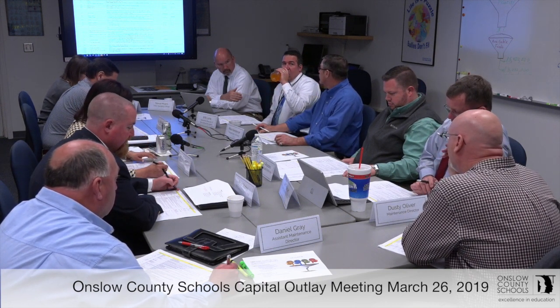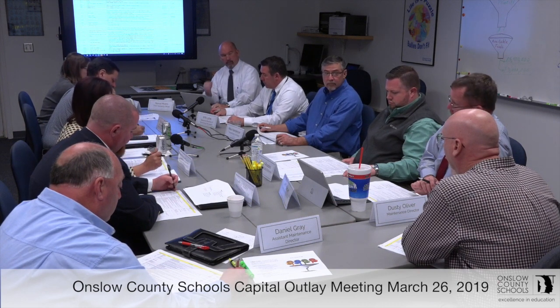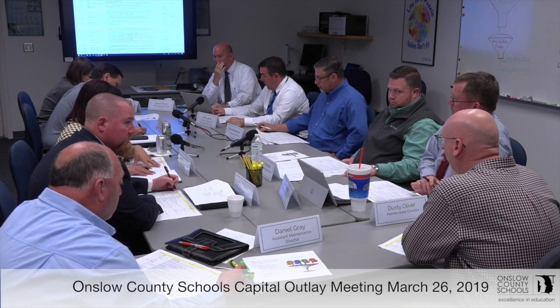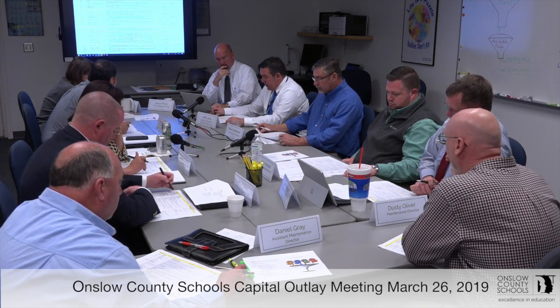Yes. It's listed as $150,000, and the reason that amount is in there is because we've got to add a fire lane to access those mobiles. We've already met with the city fire marshals, and they told us it had to support about an 80,000-pound vehicle to be able to access that. So we had to add additional funds in there, more than what a normal mobile would cost. Also, we're working on contracts to get those out to bid. Right. So that's where that number came from. And that's something that's in the classroom reduction. That was for 2019.